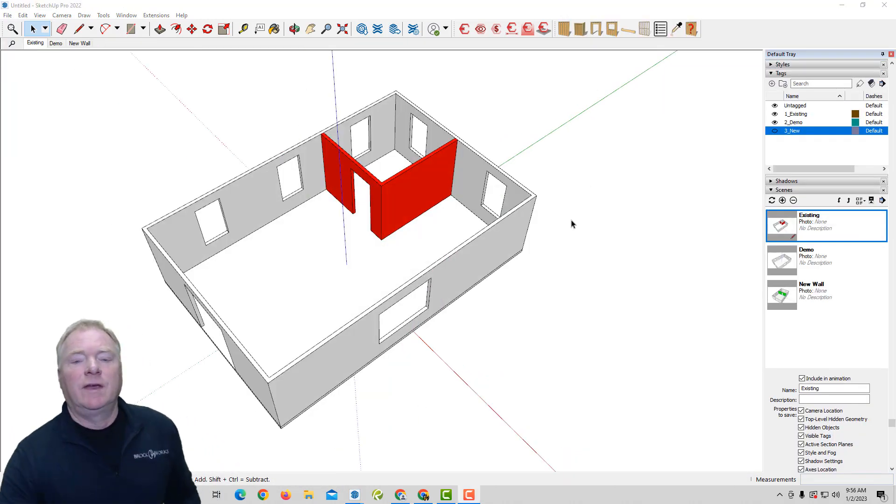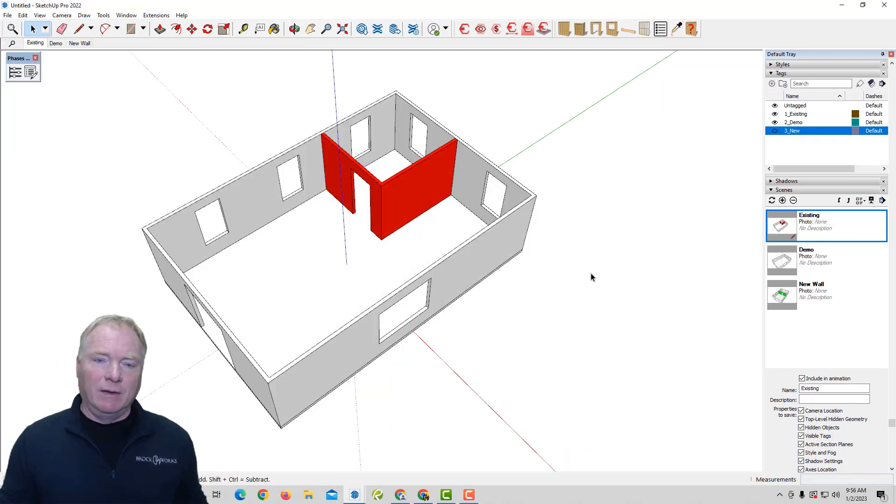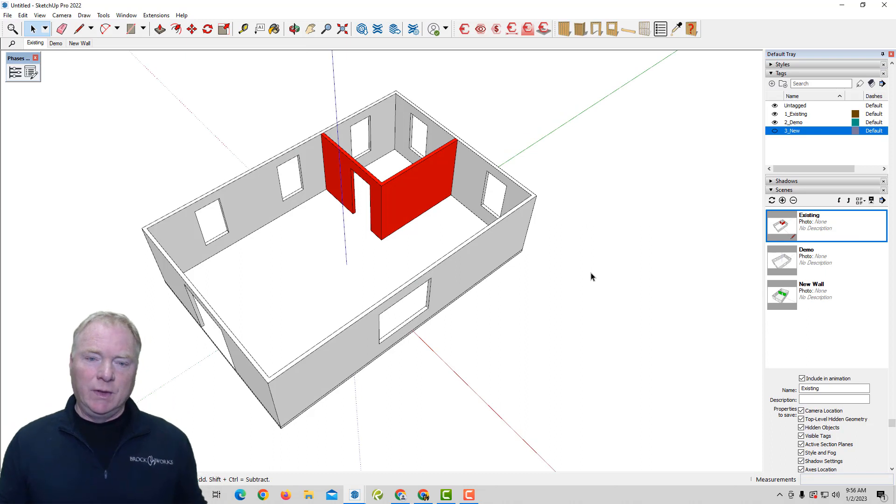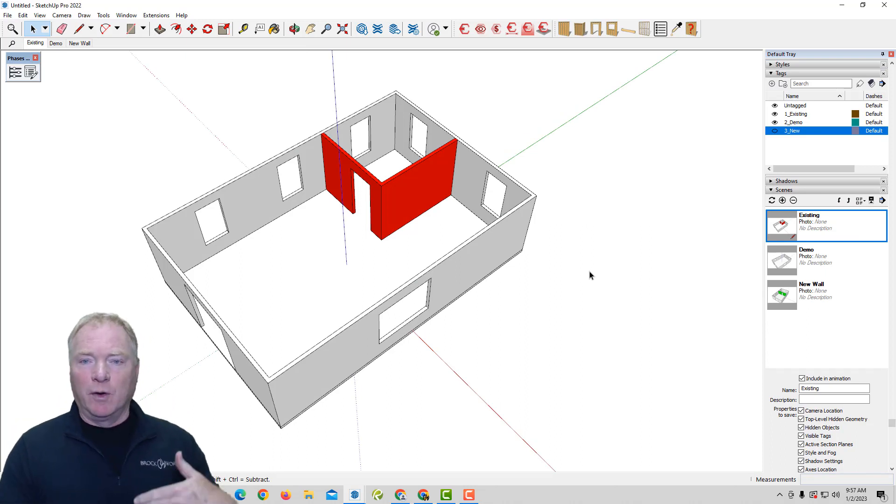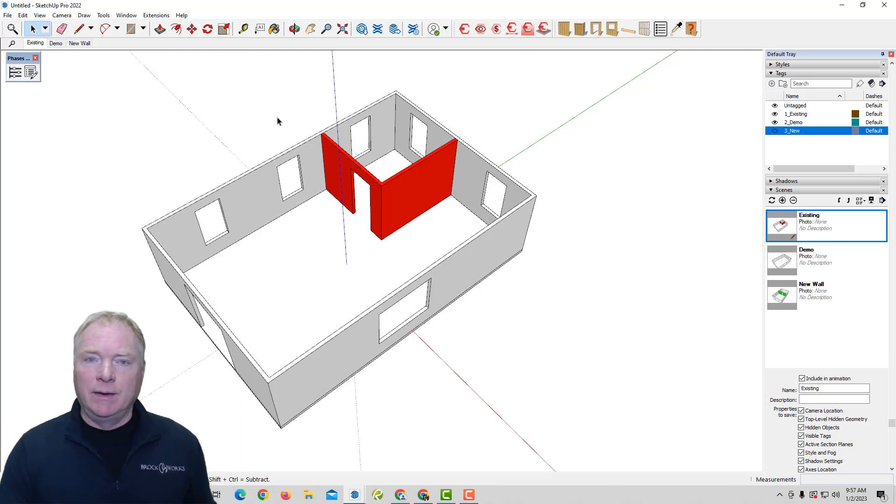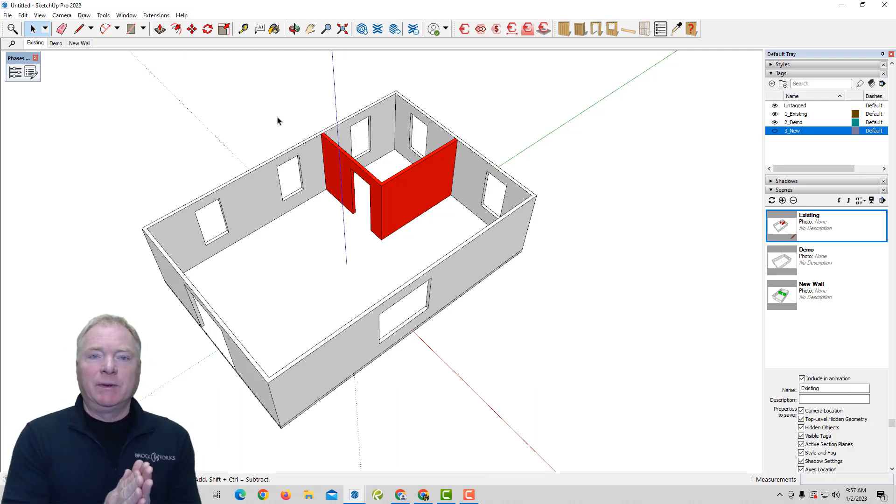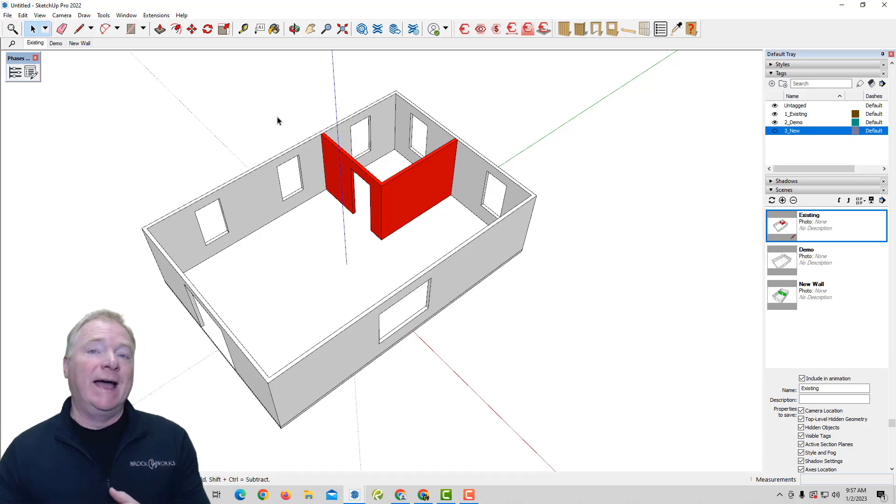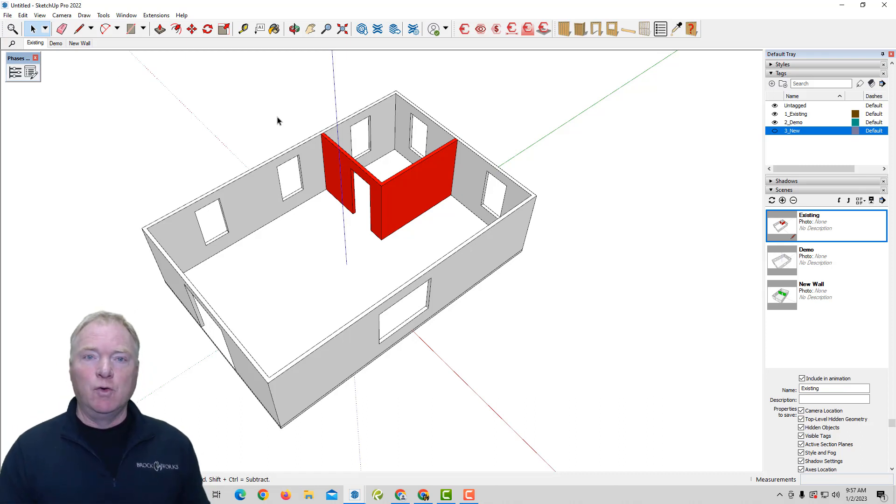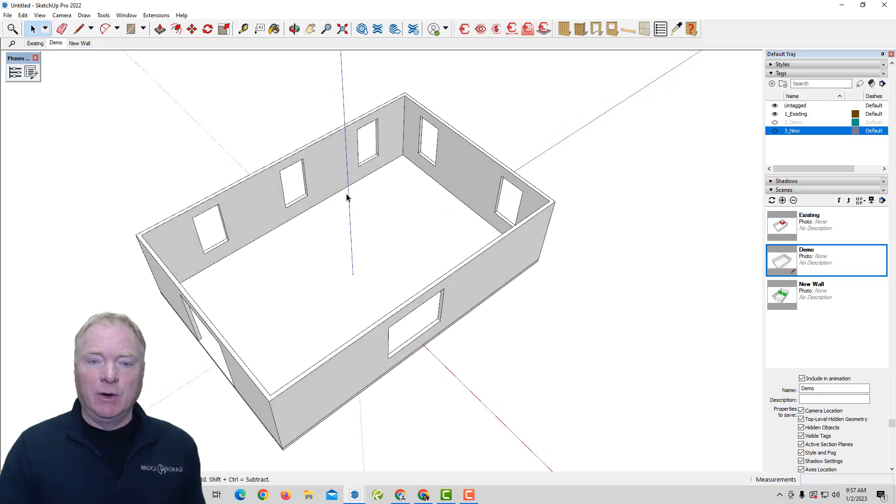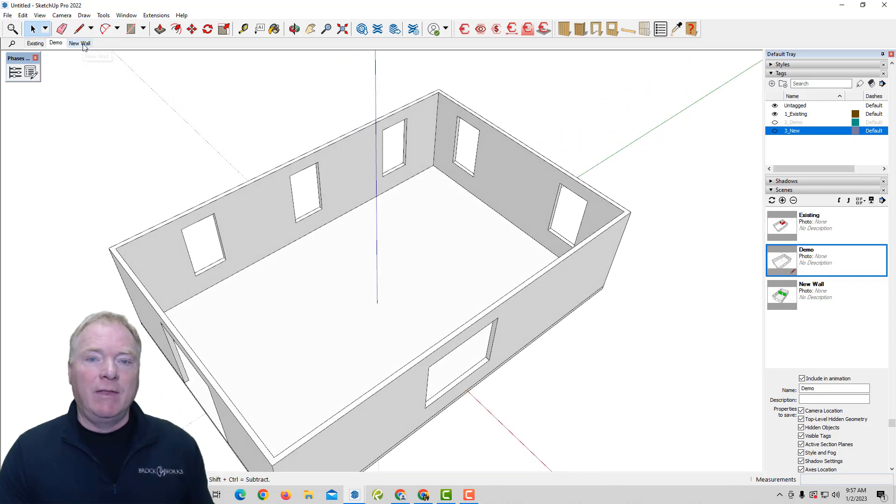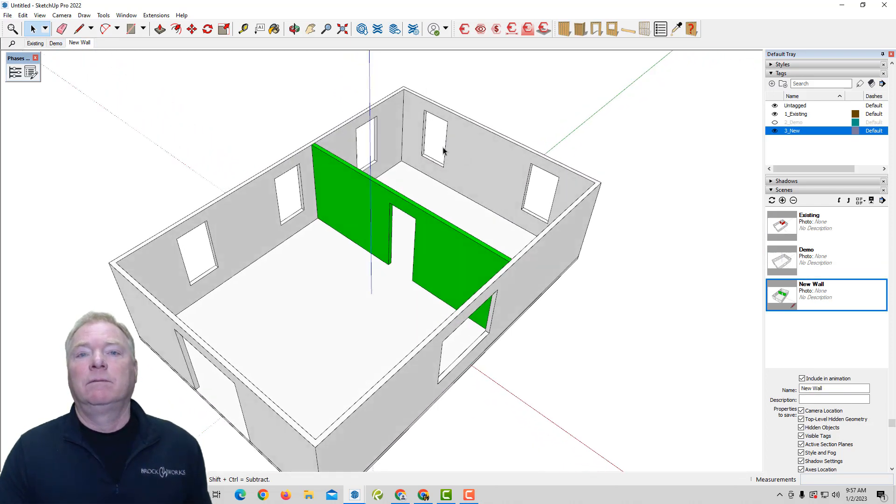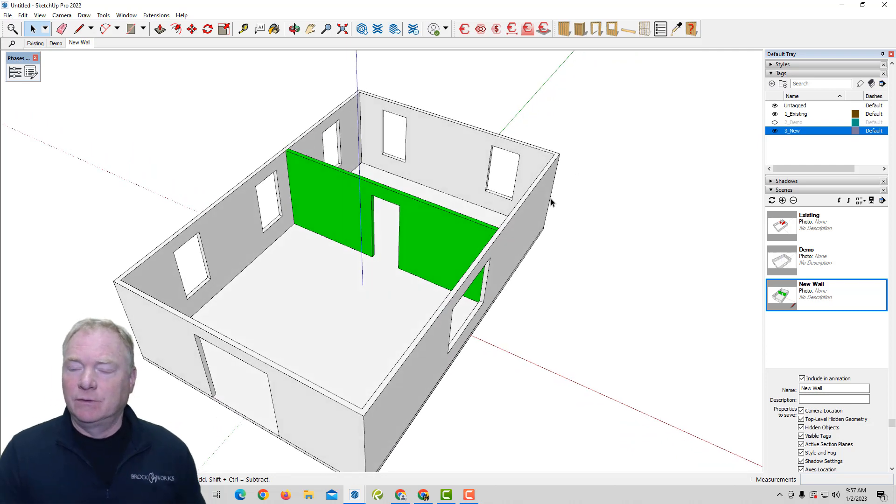So let's take a look at this example of a simple house, for example, that we're going to demolish the walls that are red. And we're going to add a new wall in this project. So in the way we typically do it is have different tags. So we have existing, we have demo, we have new walls. And I would create scenes. So we have that's the existing, then our demo, we're removing those walls, and then a new wall. And it'll be done in scenes.